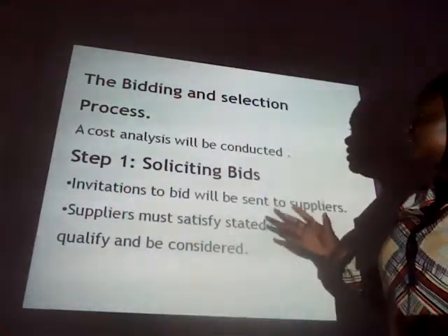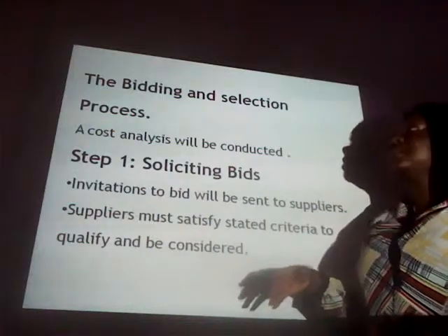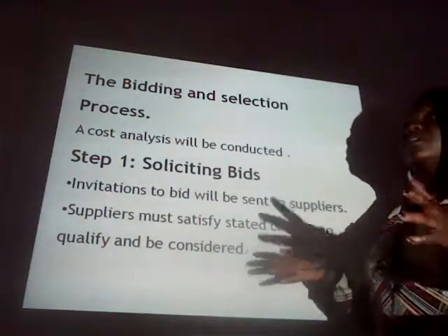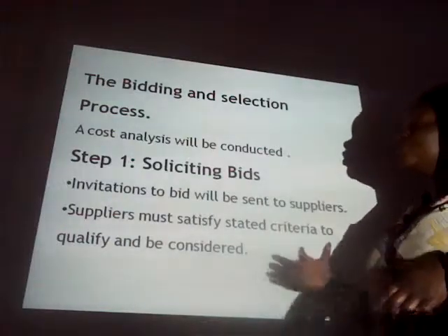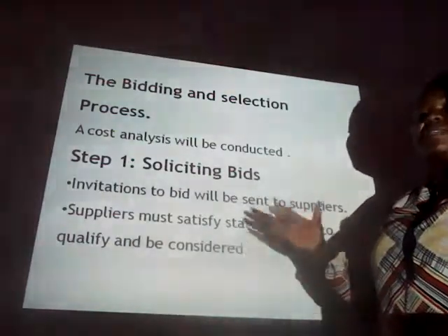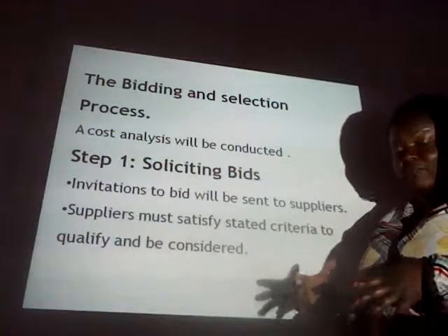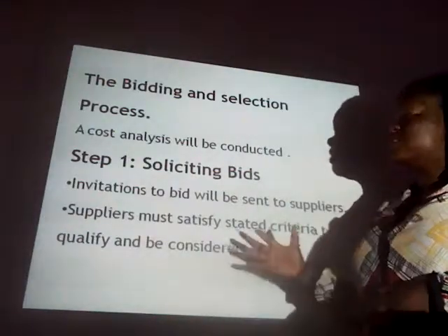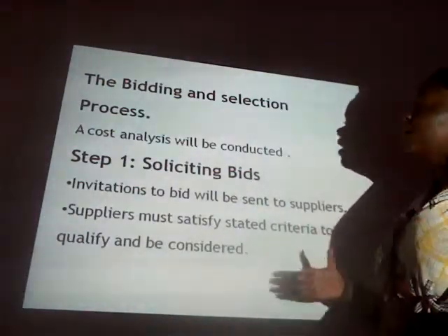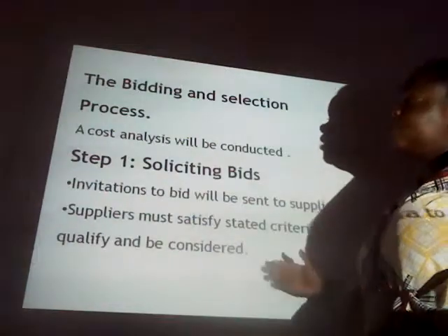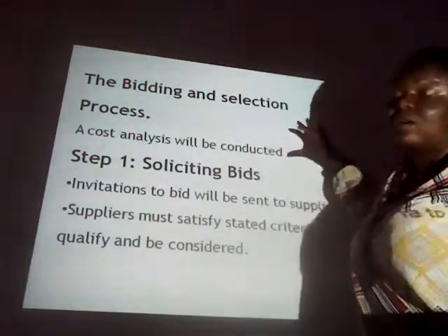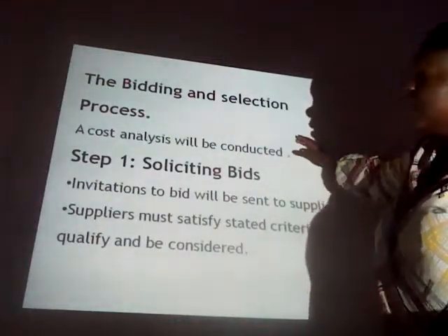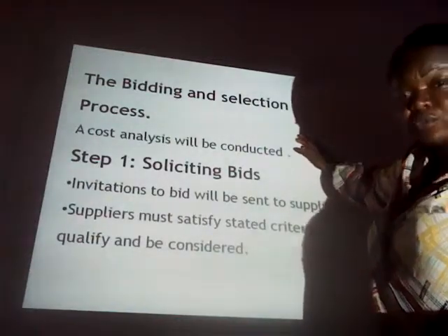analysis. We decided to do a cost analysis, which will include how much we have to spend at what time. So before we start the bidding process, we know what the suppliers are actually bidding for, and what could be provided to us at what time. We do not want stock coming in and sitting in the storerooms whilst we do not need them.